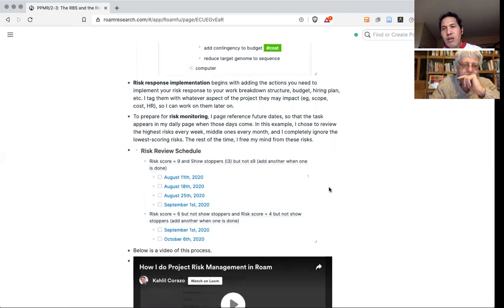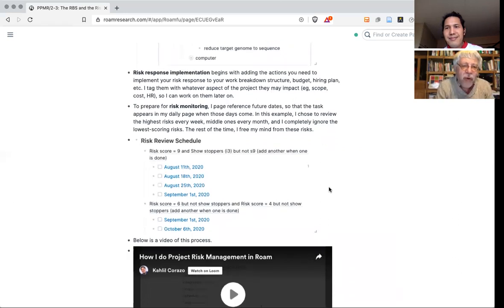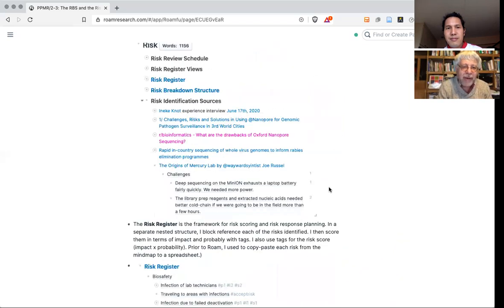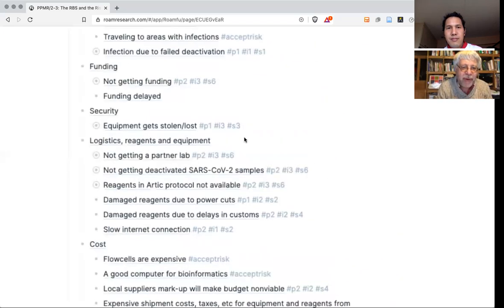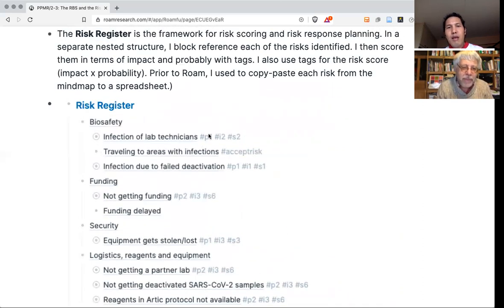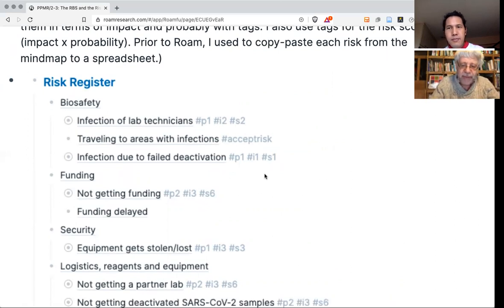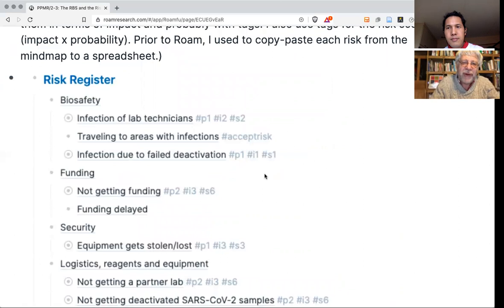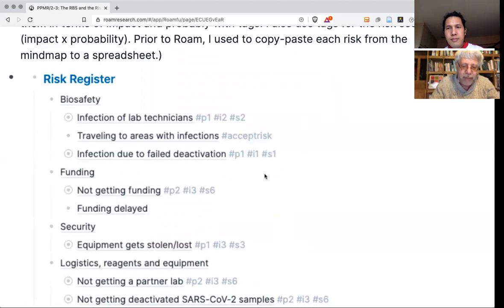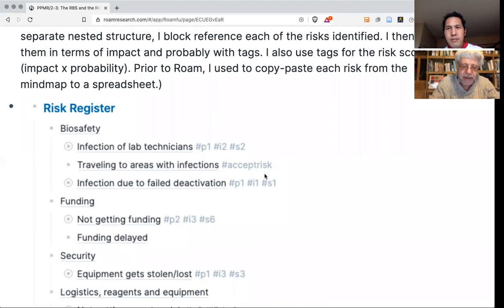Do you have any questions on this, Bruno? Yes, I have one main question. If you go back to the risk score, I didn't get how you compute it. It's just 1 times 2 equals 2, 1 times 1 equals 1. So this is a product. Okay. It's a product. Yes. Okay, I thought it was an average. Score equals probability multiplied by impact.